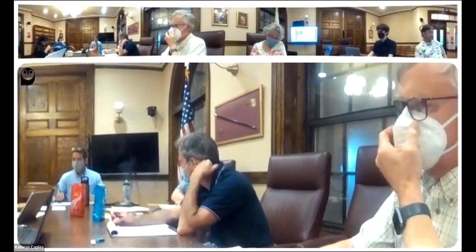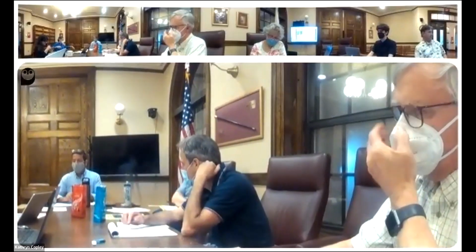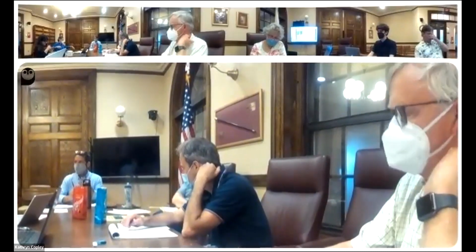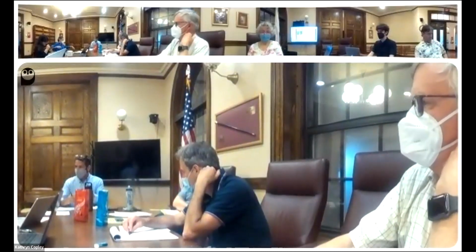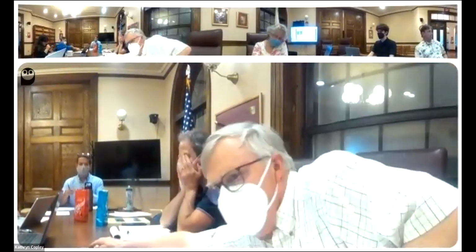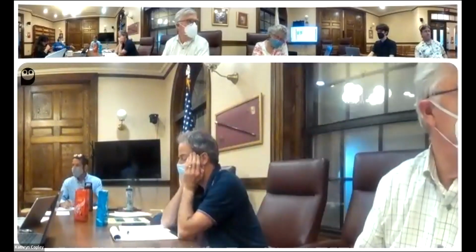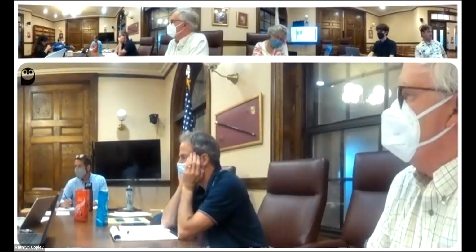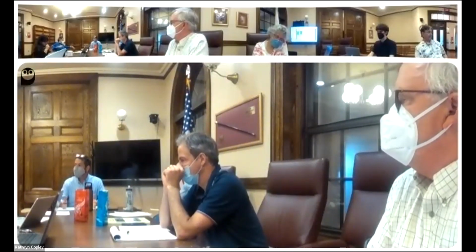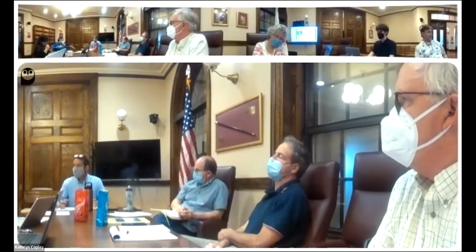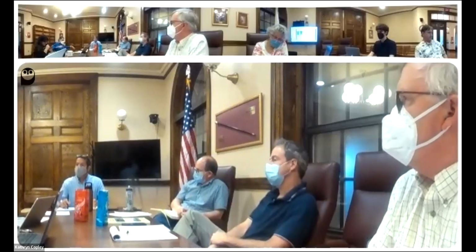I agree with you that it's probably, because you have to wait for special town meeting to get approval, then you'd have to develop an RFP, then you'd have to go through the whole process, then you'd have to bring them on board. You're probably not until before January. So that would essentially say, let's stop our activity for 6 months. It doesn't feel like a good use of this committee's charge.